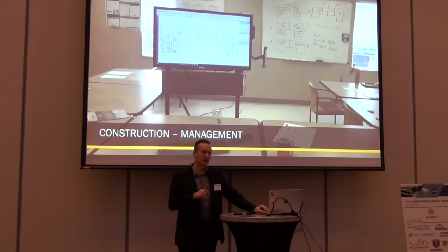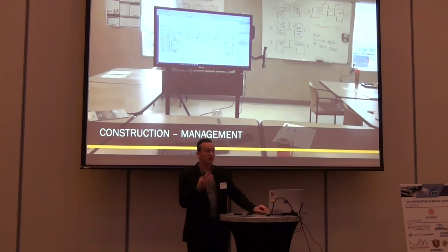But if I'm a self-performed contractor, I look at that differently. It's not necessarily just a waste factor. It may be the way that I buy drywall. Am I going to buy stretchers, or am I just going to buy 4x8s? You know, what am I using? And so, what about forms?